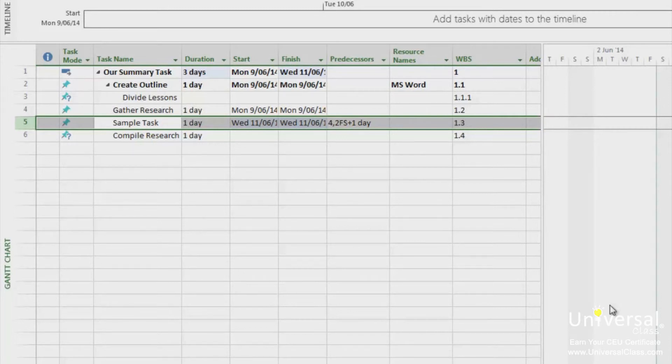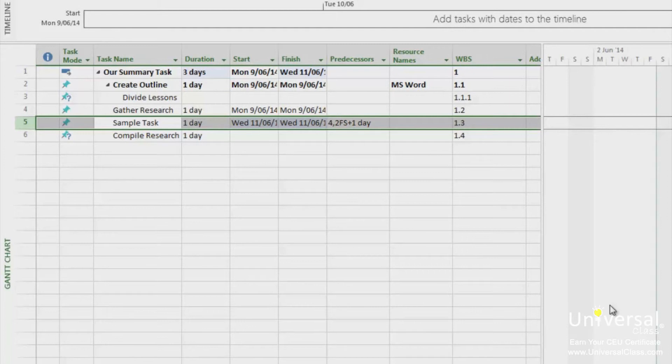When you insert a hyperlink into your project, you create a task that can be used to represent timing and or costs of another project or subproject in your plan. That said, you have to bring over timing and cost information yourself. It cannot be linked in from another project.